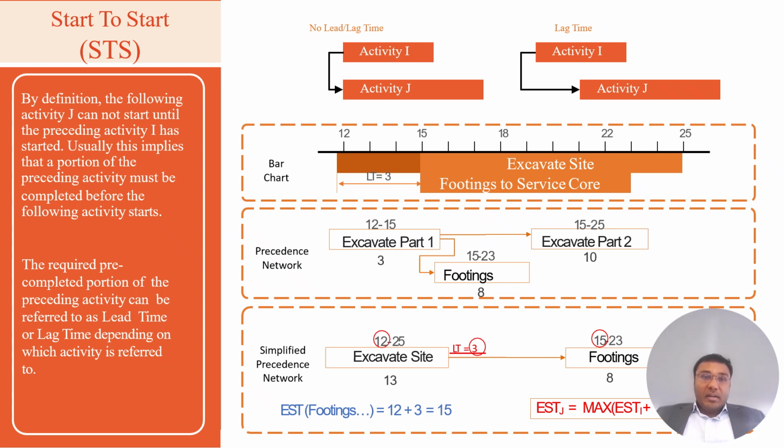Usually what this means is some portion of preceding activity must have been completed. As you see, that 3 days has been completed. The pre-completed portion is referred to as lead time. Look at the bar chart. See how some part of excavation activity has started. Following like 3 days later, footing work commences.